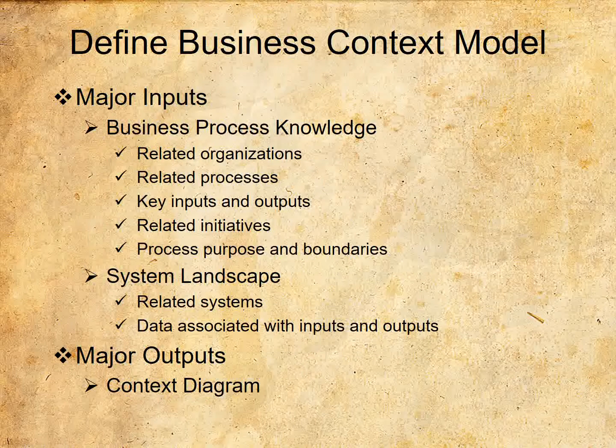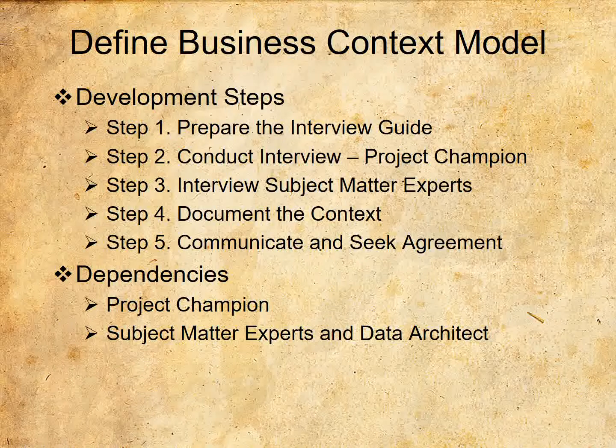The knowledge required to build the context diagram will mostly come from the project champion. The landscape of the systems should be confirmed with the process owner, as well as the project champion. The project manager will define project boundaries and determine project resources for execution and governance by using scope information included in the context diagram. The steps of developing and documenting the context diagram involve establishing the scope of the project during the goals clarification step with the project champion.